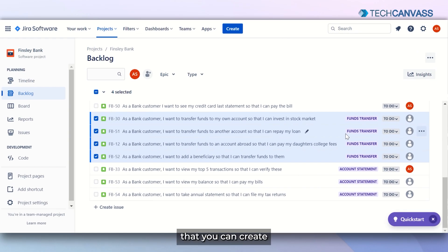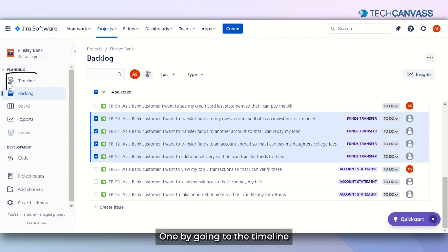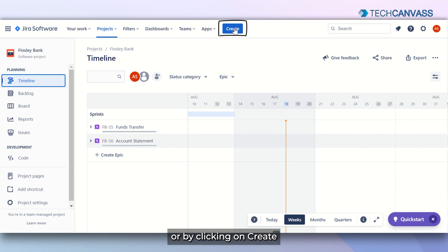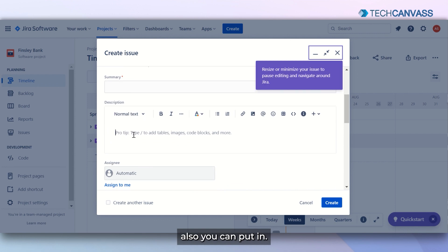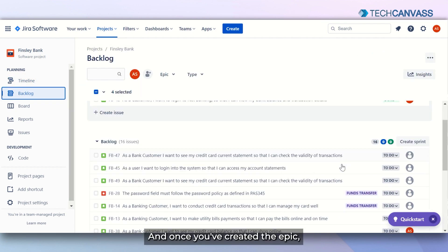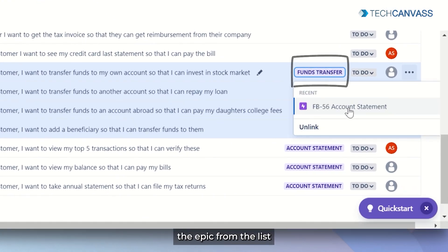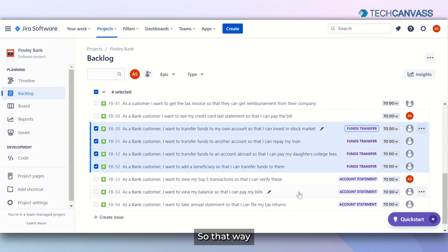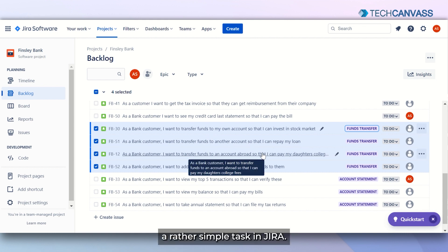As you have seen in this video, you can create an epic in multiple ways — one by going to the timeline and clicking on Create Epic, or by clicking on Create and typing the summary, the name of the epic, and a description. Once you have created the epic, you go to the user story and simply select the epic from the list. You can also unlink or reassign it to another epic if required.